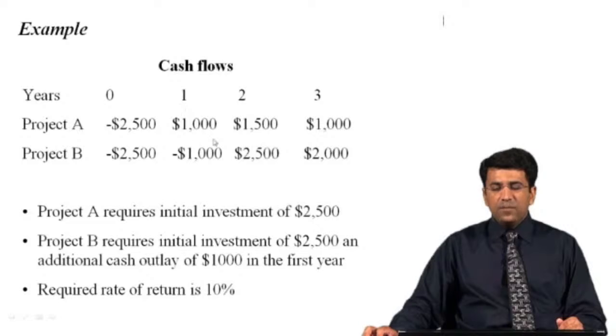Now this particular amount we will get after 1 year, so we will have to discount it, and again students will use the same formula, that is present value is equal to future value. This is the future value because we are getting this particular revenue after 1 year. So future value divided by 1 plus i raised to the power n, that is 1 plus 0.1, which is the interest rate, raised to the power 1. If we use this formula, we will get the discounted value for this time period.